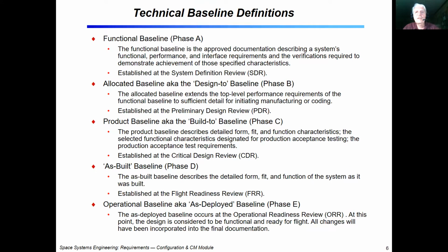So this slide sort of tells you what the definition of those baselines. So the functional baseline, or that which is established during phase A, is in essence the baseline that talks about the system function, its performance, its requirements, verifications, etc. Sort of what I was talking about last time as a pre-PDR. That's sort of where your phase A pre-PDR sort of is.